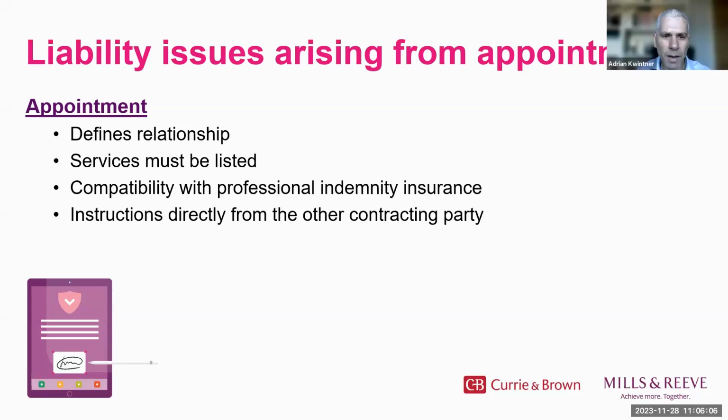Yeah, so in summary, the appointment is the instrument that defines the relationship between a quantity surveyor and their client. It's important to ensure that all of the services are properly listed to minimize any exposure to allegations around failing to do all that was professionally required of the QS. The QS also needs to ensure the terms are compatible with their professional indemnity insurance. Otherwise, if they can't change the terms, it may be best to turn down the project.